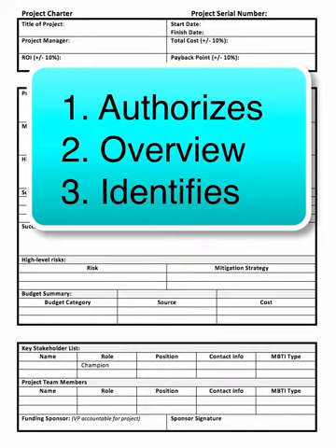Secondly, it provides a high-level overview of what's in the project. This is the conception that they have of what the project should do. When there are any disputes about what the project should do or not do, you come back to the project charter and say, oh, no, see, this is what they approved.